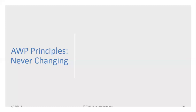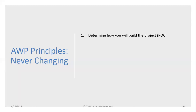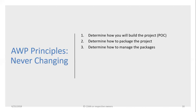The first principle of advanced work packaging is that regardless of what you're trying to build, you have to determine how you're going to build the project — that comes down to the path of construction. Whether you're building something in your backyard or a several billion dollar facility, the first step is figuring out how you're going to build it. The next step is determining how you're going to package it — construction work packages and engineering work packages — though on very simple projects it may just be drawings or a list of materials.